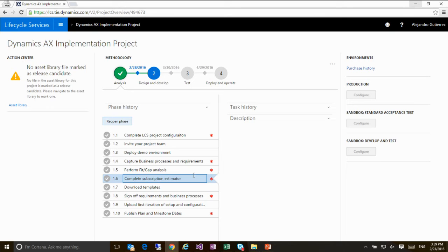Then why is this here again? Actually, you do your initial estimation during a pre-sale stage. We have a pre-sale methodology for you to walk through the business processes and the usage profile, and create those 4 numbers. That's a set of numbers you can start with, and then over here you can start refining that number through user testing, through load testing.